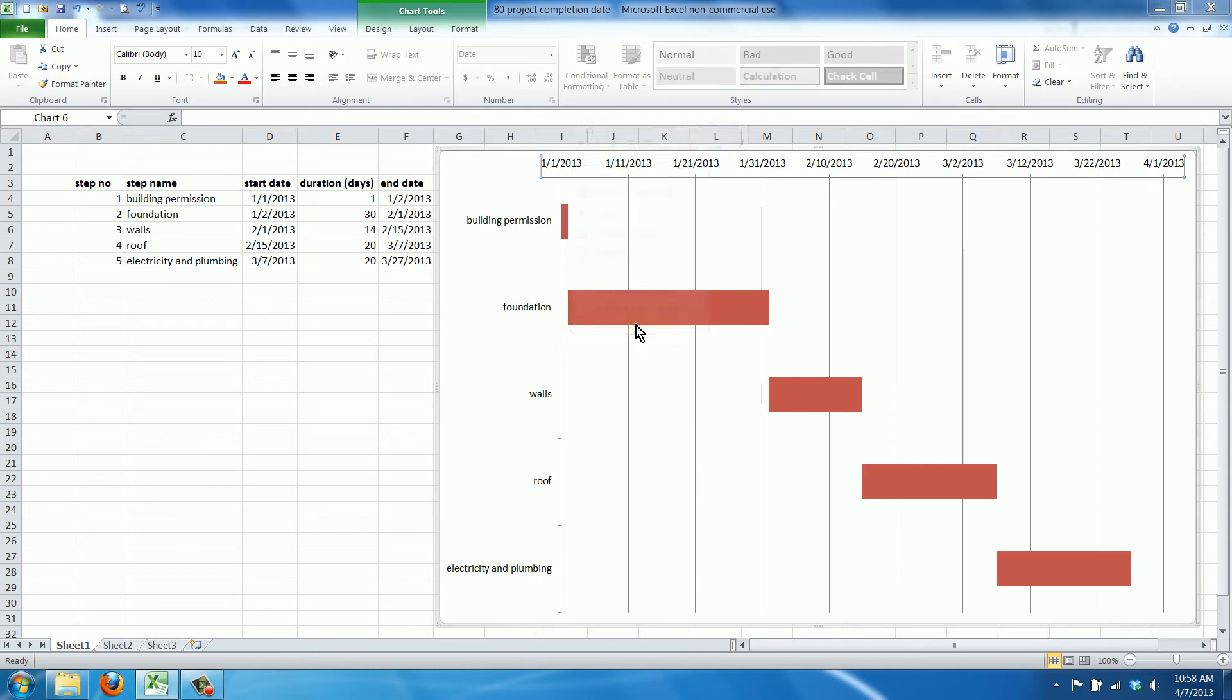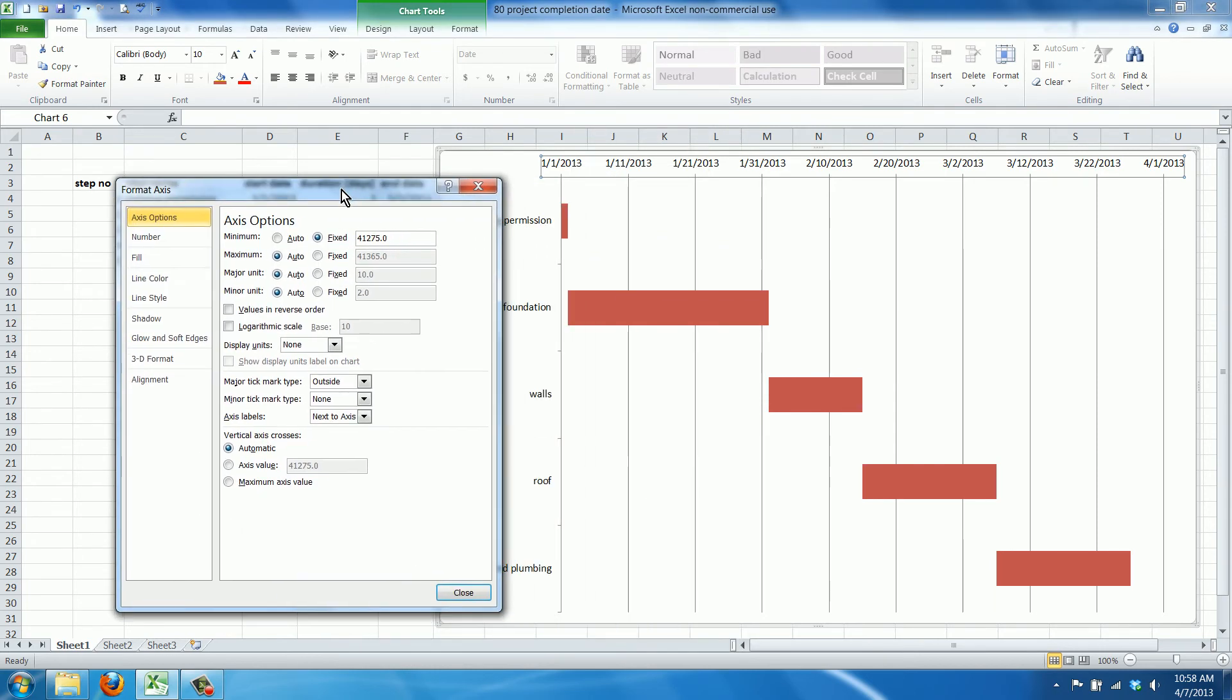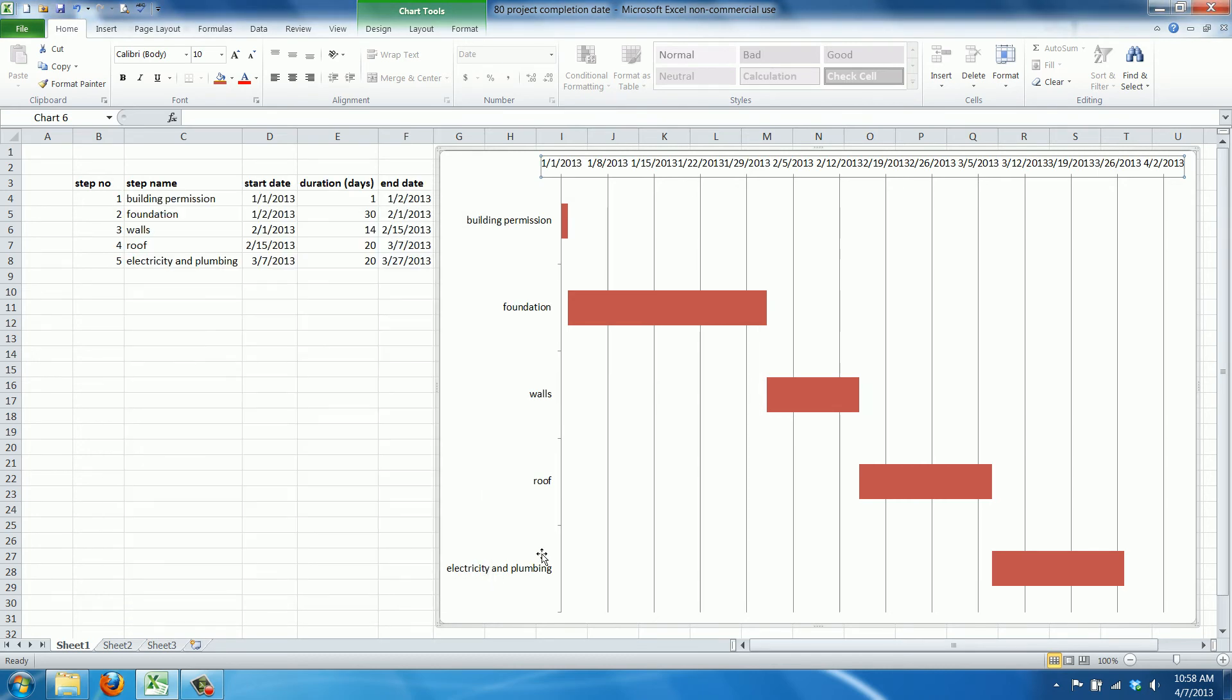Also what we're going to do is make these intervals a week. We go to major unit and fix. Instead of 10 we type in 7, 7 days. As you can see now this is all a week, which is what you want in a Gantt chart.